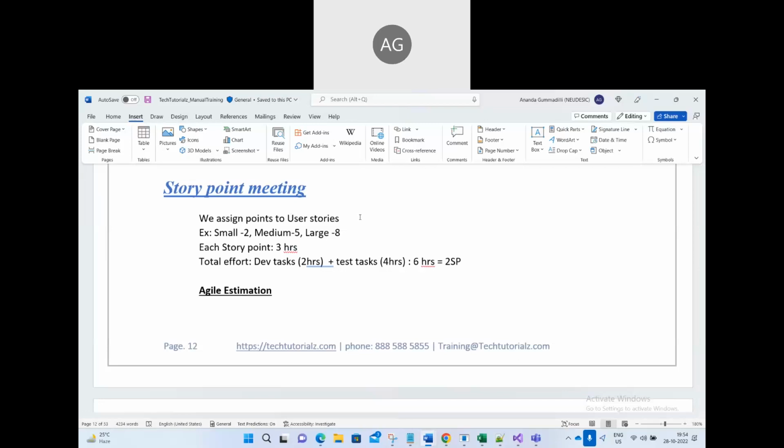Okay. So there are different approaches we can follow. Some people use the Agile cards. Some people use the playing cards in the office, right? The playing cards, we have numbers, right? 1, 2, all the numbers will be there. So today I attended one meeting for 3 user stories. We did the estimates. We give the story points. So let's say we have 6 people in the team. Everybody, first we don't tell the number, how many story points we are giving. Okay, I will call you. Based on the changes we need to make, based on the functionality, based on the complexity, we give the story points.